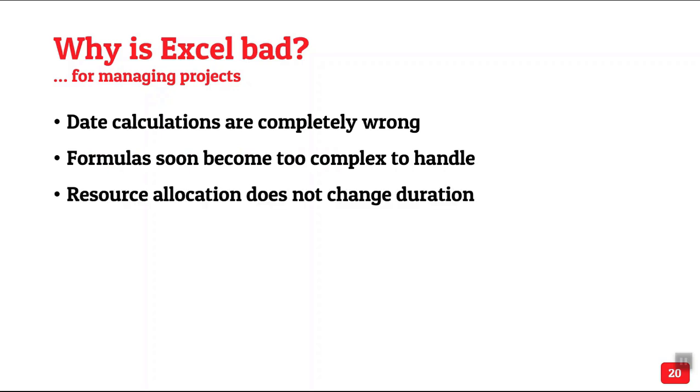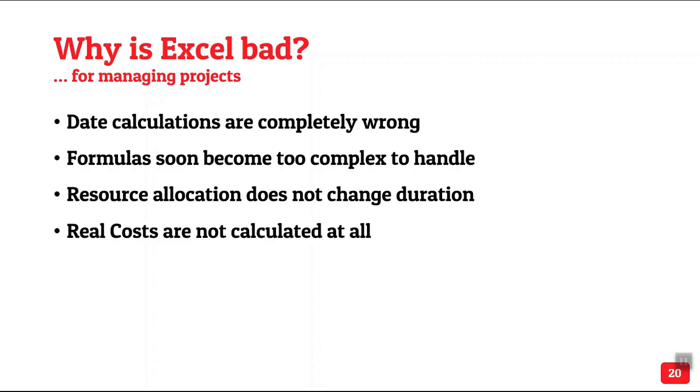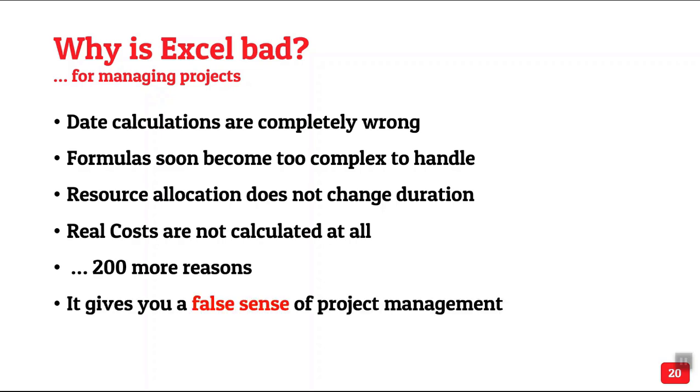We don't allocate resources. We just put names of people in a column. But if there is work done in 10 days, you put one person's name and then you add one more person that should shrink to five days. That doesn't happen. Not only that, when you put someone's name in that column, that person has no clue that you have assigned that task to them. By that time it is too late. Basically it gives you a false sense of project management. And on top of it, Excel does not create Gantt charts. So we manually create small cells and formatting and waste our precious life trying to create a simulated Gantt chart which is always wrong.